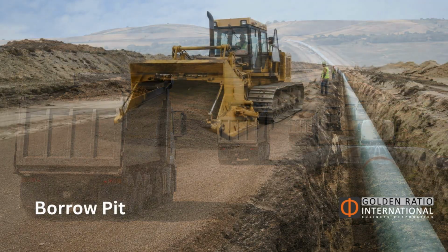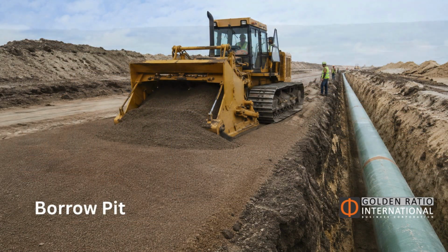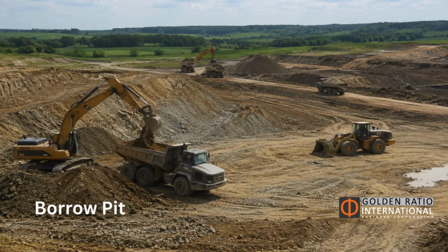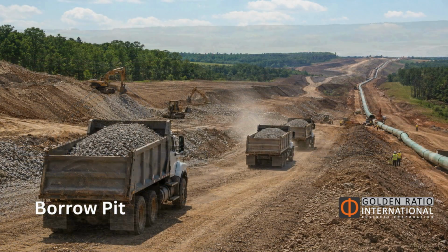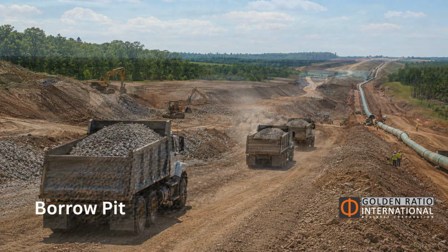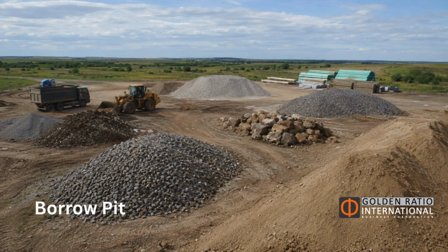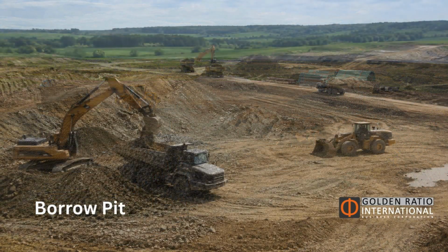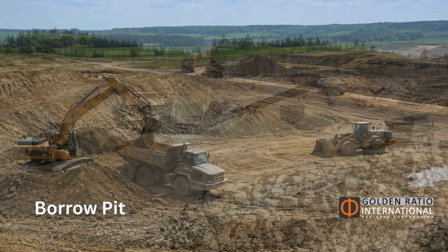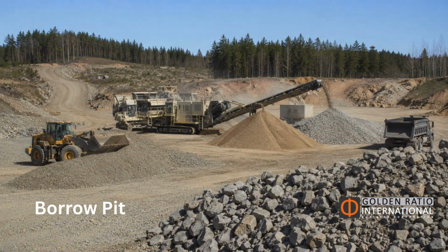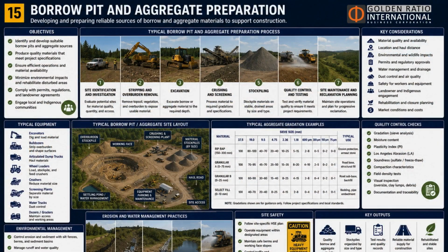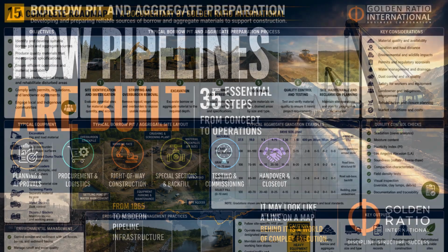This work belongs mainly to the materials side of the construction operation, but it directly affects the working area. If padding or aggregate is not available when needed, trenching, lowering in, backfilling, and access work can be delayed, which means material production, hauling, and placement must be coordinated with the field construction schedule.